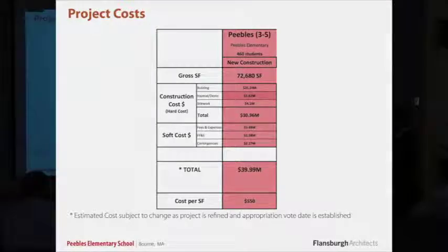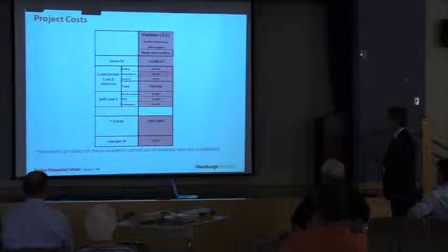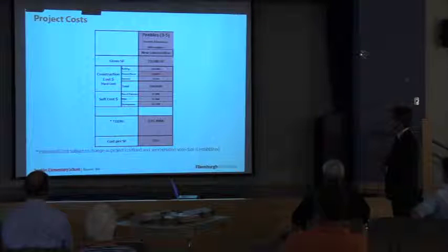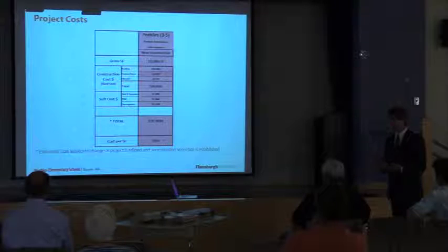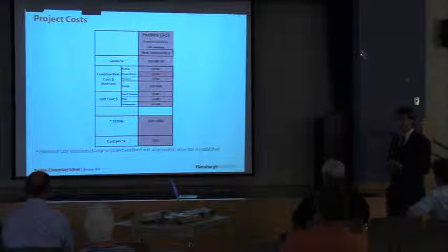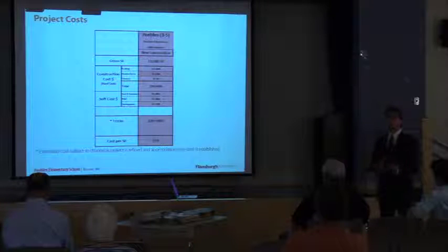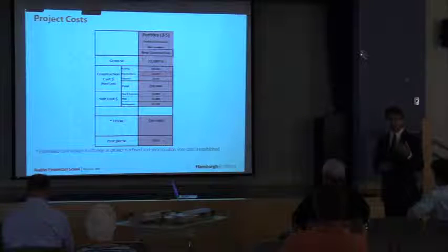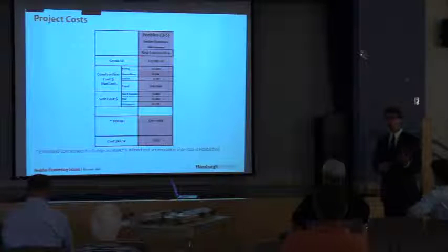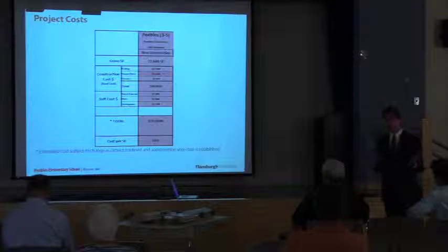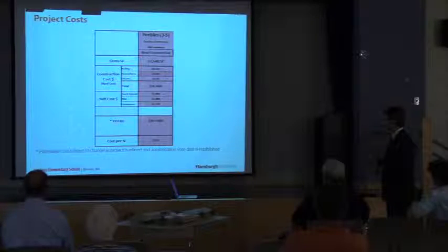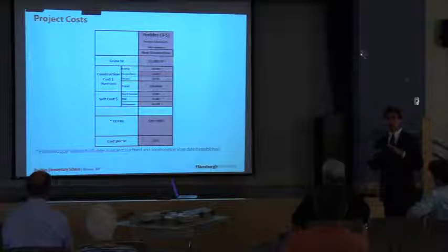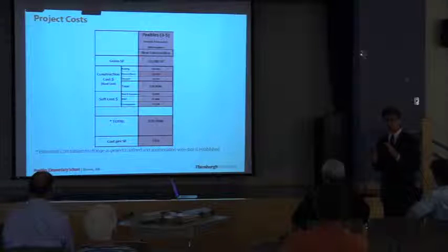Looking at the total project costs for option 5A, it's comprised of building costs of approximately $25 million, hazardous materials and abatement of approximately $1.6 million, and site work of approximately $4.1 million, with a total of about $30.9 million for hard costs. That is the bricks and mortar. Along with that are contingencies, furnishings and fittings and equipment, and educational technology and systems, all leading up to a total project cost of $39.99 million. That is the total project cost for option 5A as we see it now.